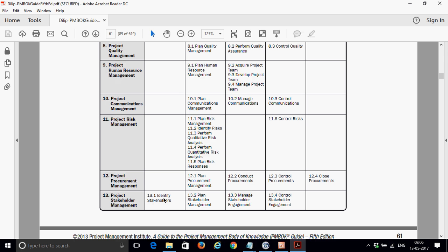According to the definition, how is it going to impact the developer? For example, if I'm a developer in the project, how am I going to get impacted by the project? You can impact the project because you're going to work on some activity. Being impacted is different. You can directly impact the project: I have been given some task, I was supposed to do it in the first week, but I have not done it, which means the project can be delayed, right? Some critical activities have been assigned to the developer, and some challenges come, and he was not able to complete it. The project can be impacted for one week.